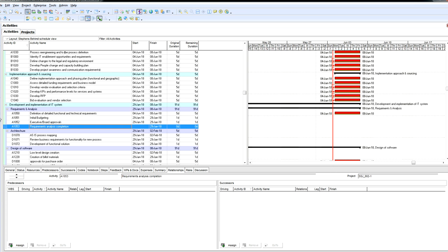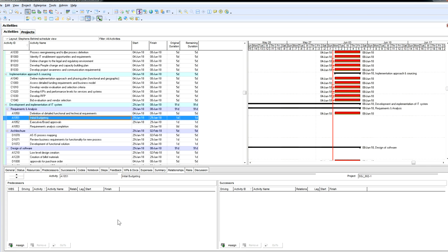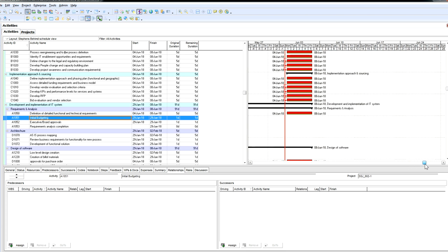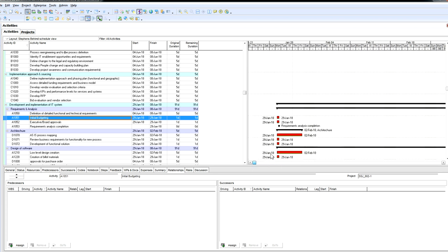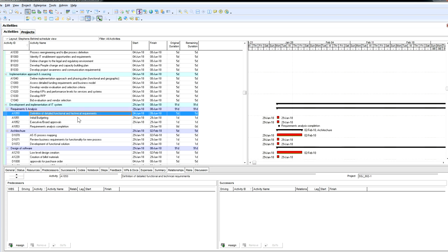And the activity for this has been created as a 1-day duration. Now I'm struggling to see where it's imported my activities. Let's just look through. Oh, here we are. So these are the dates, and because we haven't got actual links in there, they're so far back. Up here we can see no predecessors or successors, and these activities obviously all follow finish to start. So there is an easy way to do all activities that follow finish to start. You just select, hold down your shift button and click on the activities, and they will all be linked.